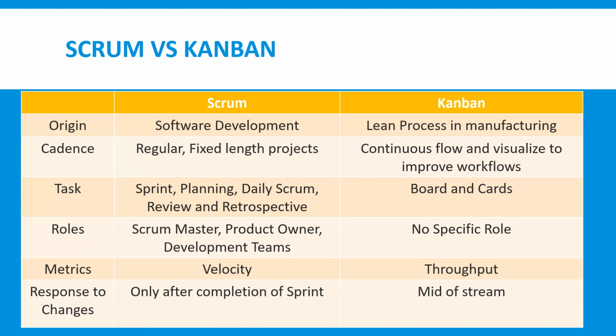So how can we do it with throughput? Suppose 90 story points, again the same thing, or rather I can say suppose 30 stories, right? So 30 stories you completed in 3 months. So your weekly Kanban throughput will be 30 divided by 3, which means 10. So 10 will be the Kanban throughput for your team.